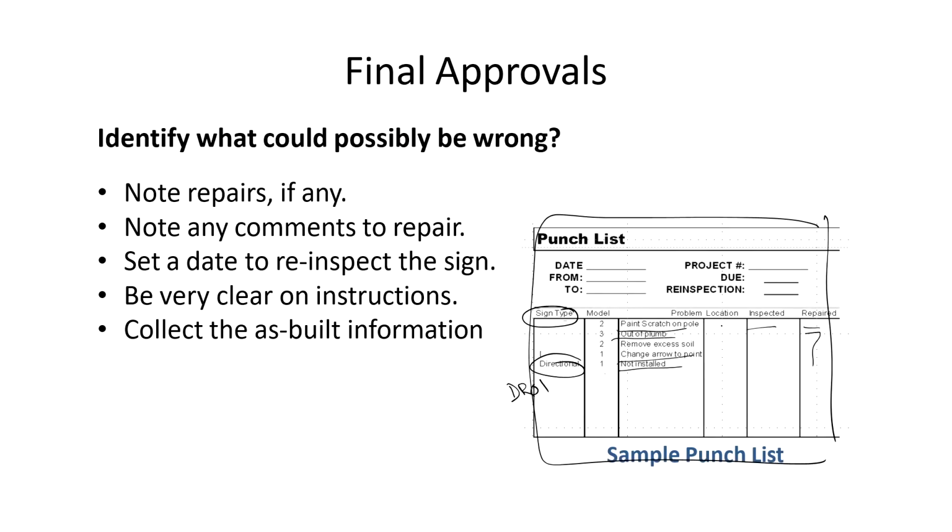But you need to be assured that if the changes made by the project management team affect your signage layouts, positions or metal finishes, the cost has to be borne by them.